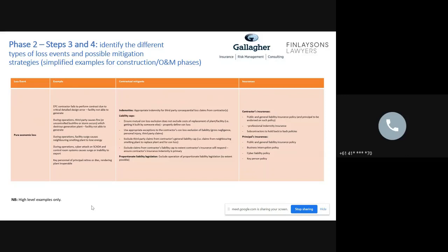or a couple of other exclusions that might be worthwhile looking at including for economic loss, and that is any cap should not apply to anything that the contractor does that is grossly negligent or reckless, or that they really should have avoided, but they were effectively indifferent to that. Then there's the expectation there that the contractor will pick that up. Their limitation would only apply in the event that they were unknowingly negligent in their failure that resulted in that loss.